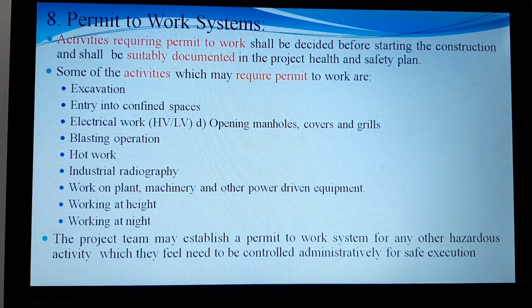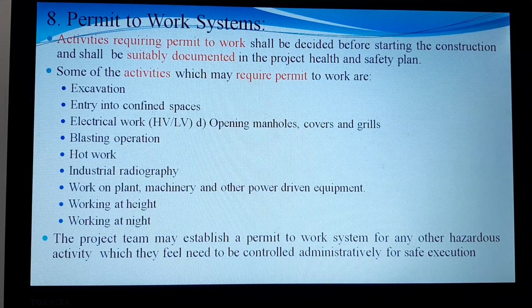Permit to work system is very important. There are different complicated works involved in any site. So the activities requiring a permit to work have to be decided before the start of any construction works, and it has to be suitably documented.